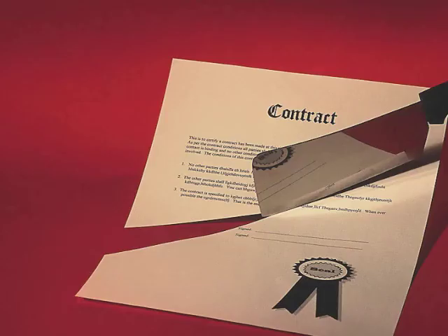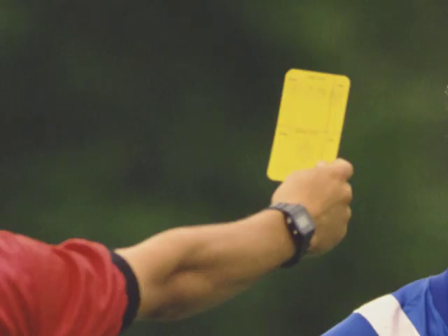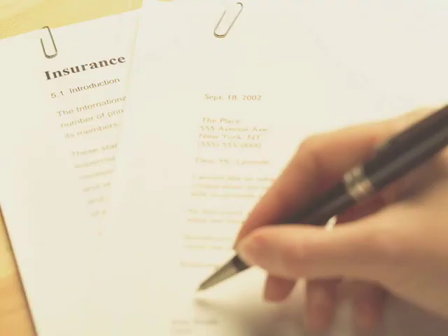Legal and contractual issues. If you outsource work for your project, you may need a written contract outlining the deliverables, deadline, and cost of the work they undertake. However, just because they sign a contract does not mean they can deliver. Firstly, make sure you understand fully the knock-on effects for your project if they fail. Secondly, if appropriate, include a penalty clause that will cover the knock-on costs to your project. Thirdly, make sure they have the capacity or the insurance to cover the penalties included in the contract.